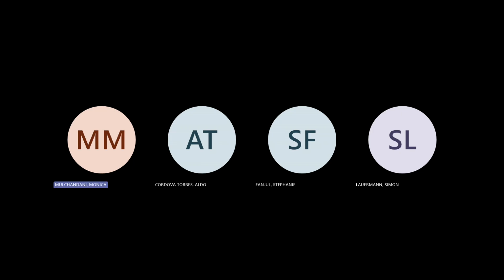Active means it's started. So this is how the whole life cycle works: the status keeps changing, but the basic rule is inbox, active, ready to forward or complete. And if it's ready to forward, it calls for the action of forwarding, which is in the application. There's a routing project we have. We'll touch on that, but as an overview, that action basically moves it to the other department. That's when it really happens, and it's recorded that it was forwarded at that time, on that date.